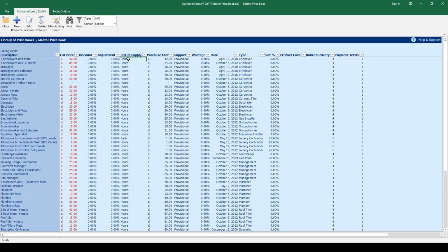You'll see there's many different labourers in the list and also gangs of labourers, and there's probably actually more than you would actually use. You're also likely to have multi-trade people that you use, and all you need to do is set their rates to match the tasks that they perform. So if you've got a guy called Bob who does your bricklaying and also your joinery, then you'd find the bricklayer and the joinery rate and set them to match what you pay Bob.